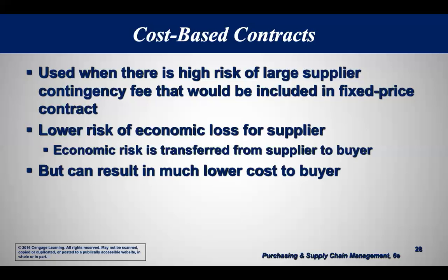I'll want to see records of what your costs actually were. What did it actually cost you to buy the wood and buy the materials and the screws and the things? And then how much time did it take you, and how much do you pay your people? Or how much do you pay yourself? And I'll pay you your costs. So you have no risk.